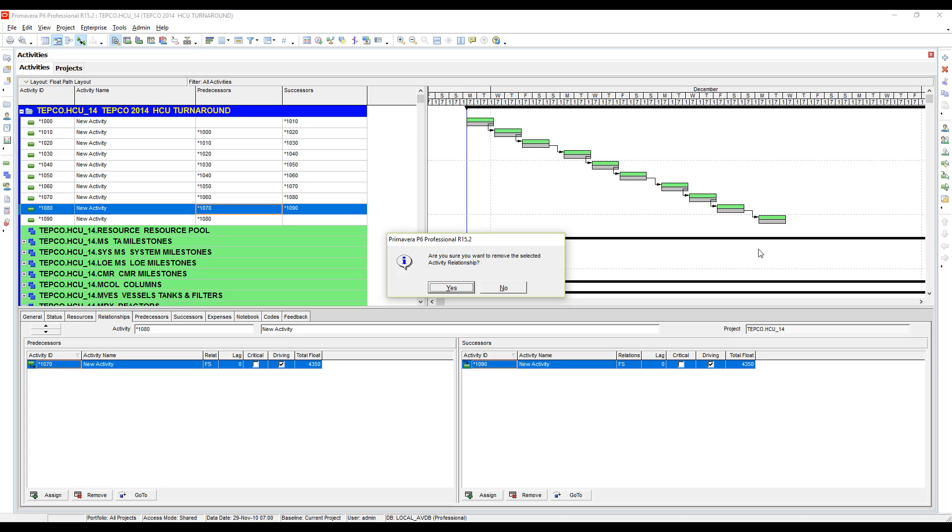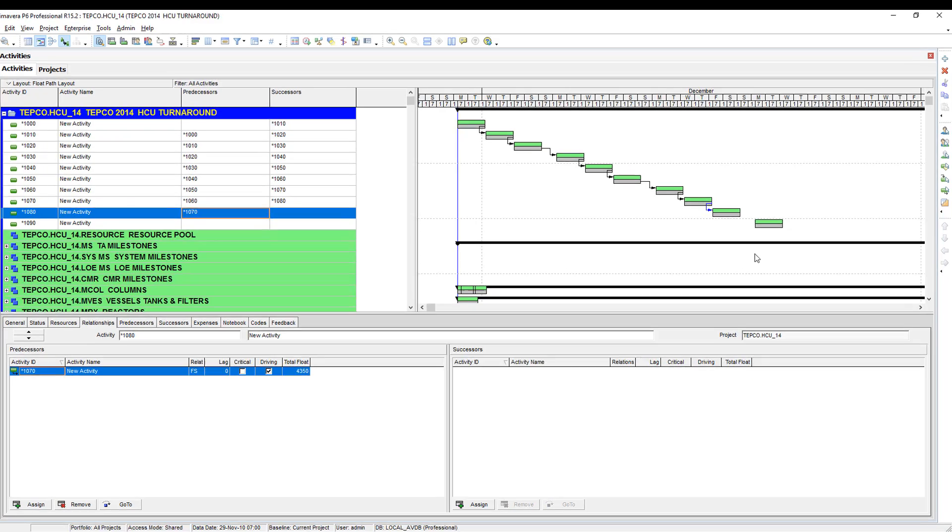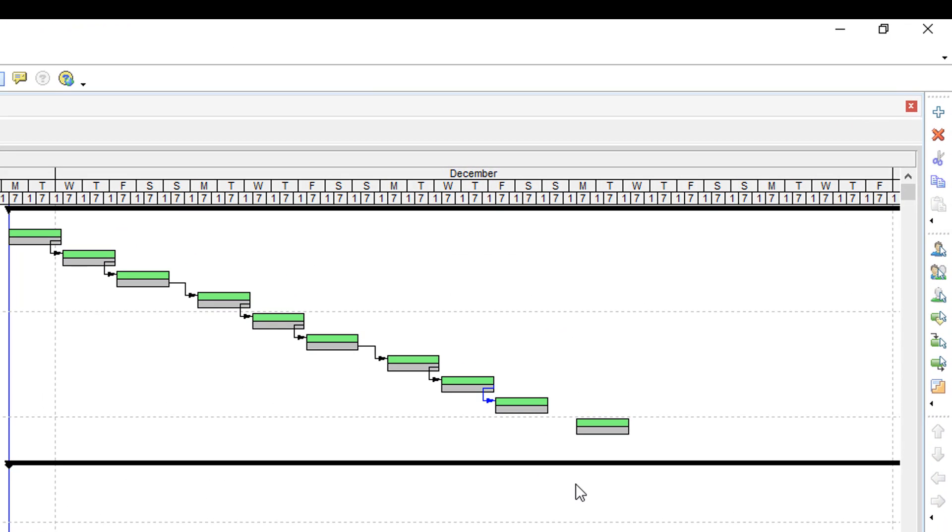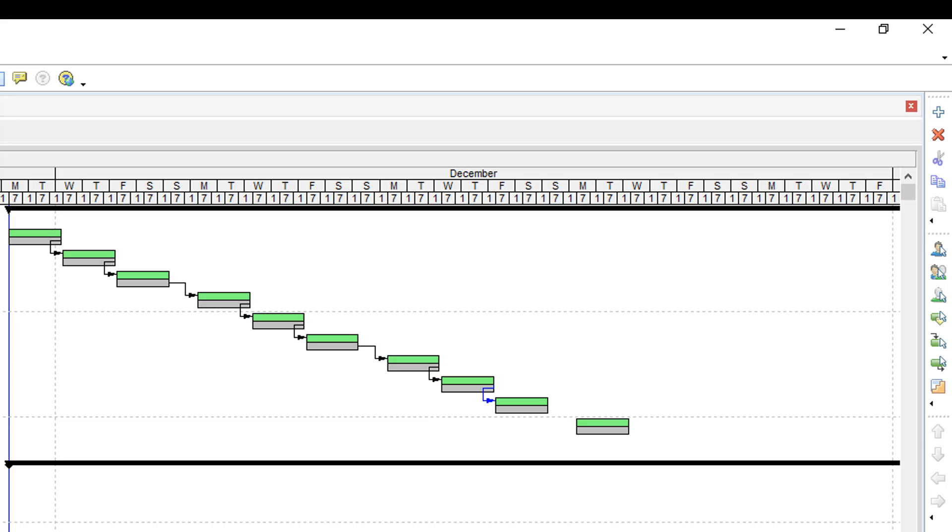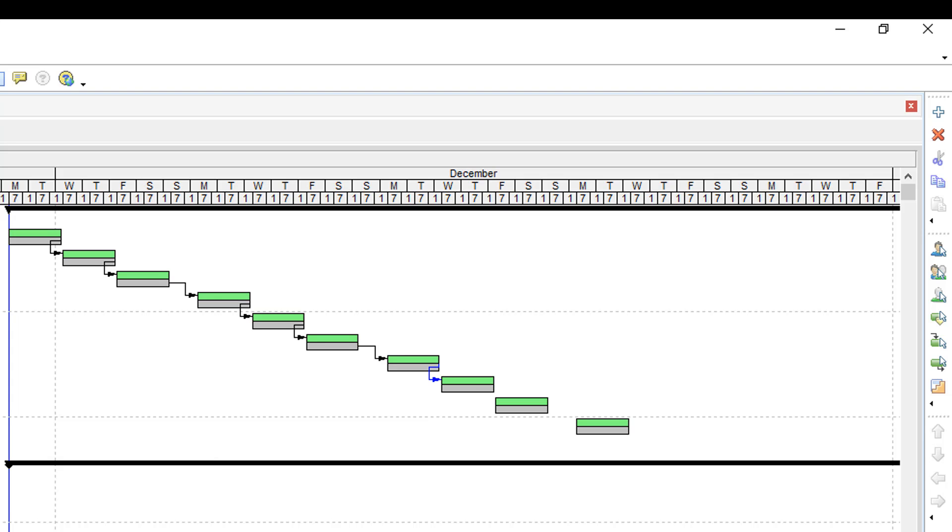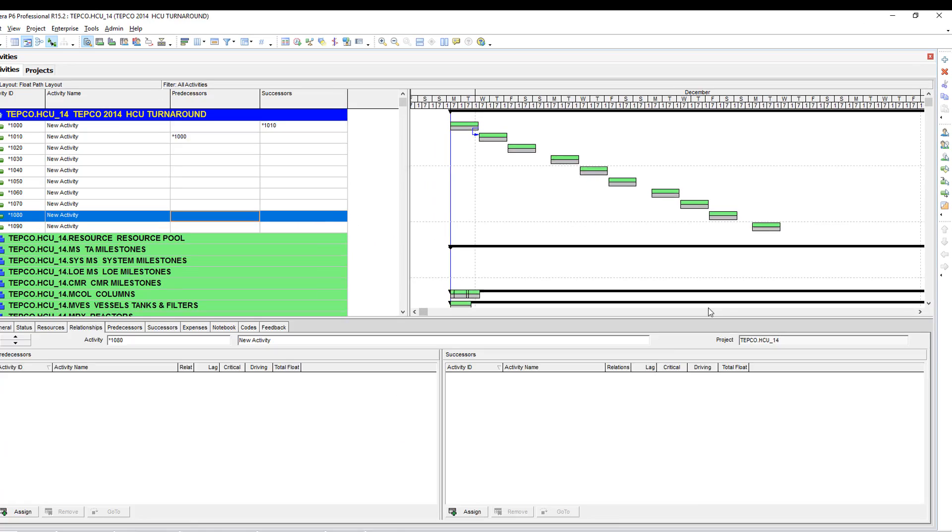Yes is already active there, so I can just hit enter on my keyboard. What happens in a lot of cases is the relationship jumps back to the next one, so you'll notice that the next relationship line there also turned blue. So I can just hit delete on my keyboard again and hit enter. You'll notice that it jumped again, so I can just keep doing that over and over again until I get to the end.